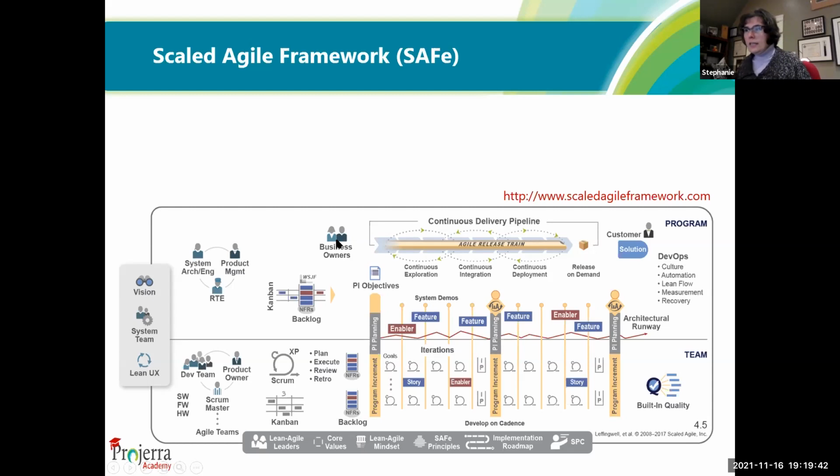They would say, well, I need this particular capability in the Q1 release. I need this capability in the Q2 release. I need this capability in Q3. And then once we had the bucket of capabilities required per quarter, it was up to us as a development team to figure out, well, I can do this in sprint 1, I can do this in sprint 2, and then you guys can have it available, because you're going to need to integrate with it in sprint 5. And then we were sure that we could deliver it all by the end of the 12th sprint, which was the end of the quarter. And that worked out quite well for us.